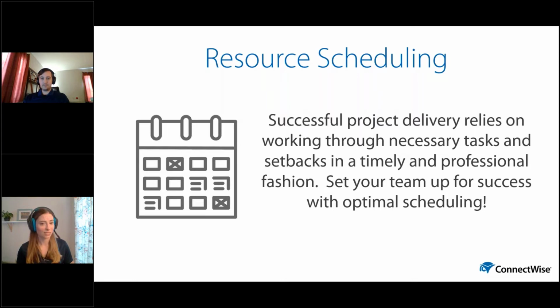The second bit is the work plan, which Mitch already showed us. We can use project templates, we can use bundle class products, different ways to build out those task lists of the details of what needs to be done for this to be successfully delivered. And super important that Mitch touched on this as well is the budgeted hours. How long do we expect this to take? Because if we're looking at our member calendars, we're considering time off requests, the number of team members we have, the budget hours really allow us to dispatch effectively and also ensure that we're not overloading our team.